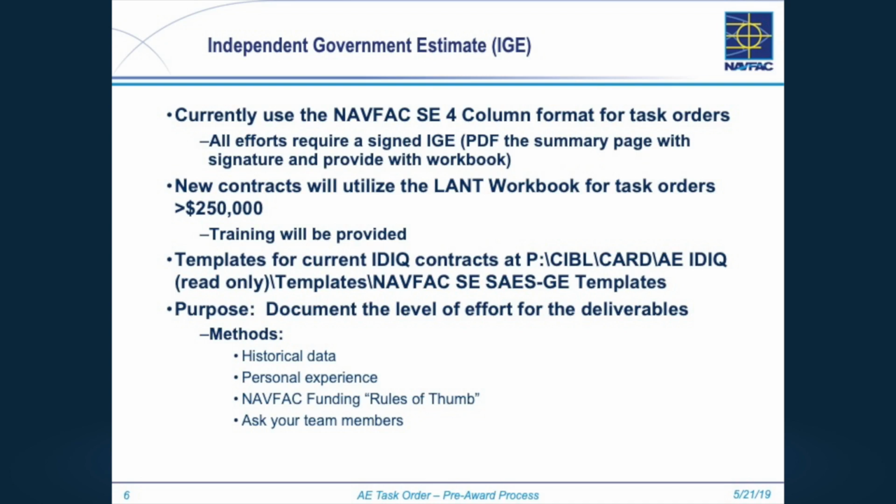One suggestion I've heard from others: once you set up your template specifically for your engineering services, before you start putting numbers in, save a blank copy that has the heading of what project it is and your summary of what you're going to fill out. Then that gives a clean copy for the acquisitions person to send to the AE. It's easier to work with, maybe. We currently use the 4-column spreadsheet. Column 1 is the IGE,